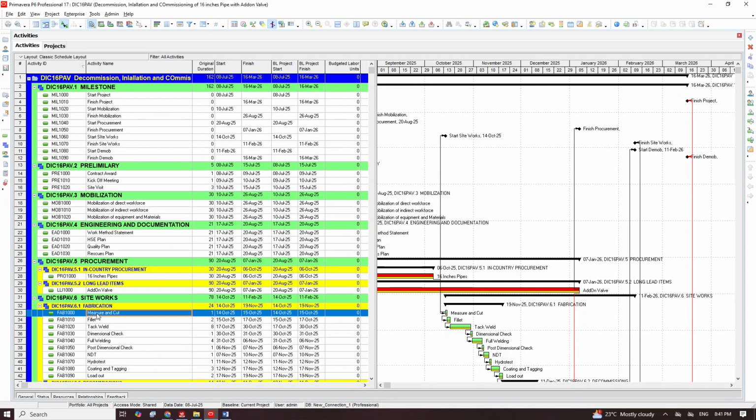You now give out the time or days it will take the welder to finish that 300 weld joints. So with that, you can now start answering yourself some questions. Let's say it's taking one person 100 days to finish 300 weld joints, right? How many days will it take 2 persons? You find out that it's half of 100, which is 50. Then what if I bring in 3 persons? You find out that it will be something like 25 or 20-something days, right?